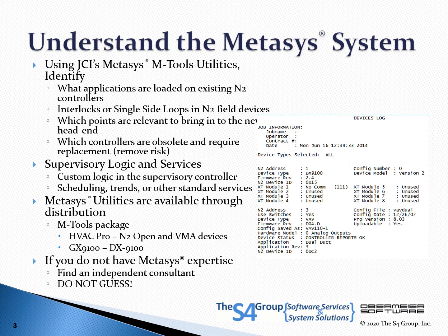maintained in the past. As mentioned on the previous slide, the HVAC Pro software is used to create a report of all devices on the N2 bus. It is also used for commissioning of most Metasys controllers. This program can also generate the .prn files that can be used to create custom device type templates.